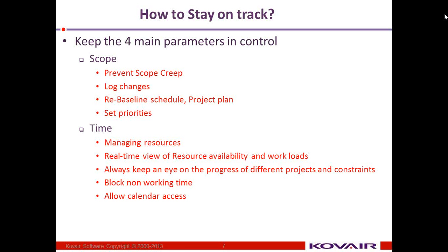And at the end, we should always give access to the calendar. As I said in my previous point, blocking non-working time and allowing calendar access go side by side. Because if we don't have access to the calendar, and the project manager or the PMO is in the dark about the resource availability, the working and non-working time of the resource, then it will hamper the schedule a lot.